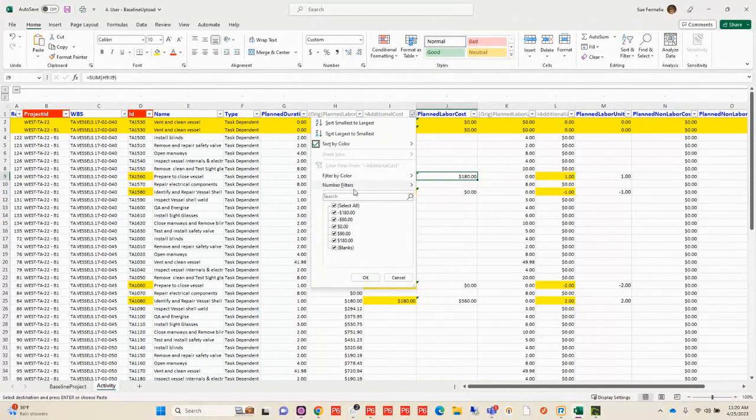Now, finally, I want to take a look at how you might want to do some updates with P6-Loader. So I have two projects here, and I've gotten my first update. However, I have users who are doing updates that don't use P6. So what I've done is I've created a sheet based on the information that I need them to work with when they're doing my updates. So in P6, I do this frequently. So I can extract the data every time I need to, and I can actually save what I want to